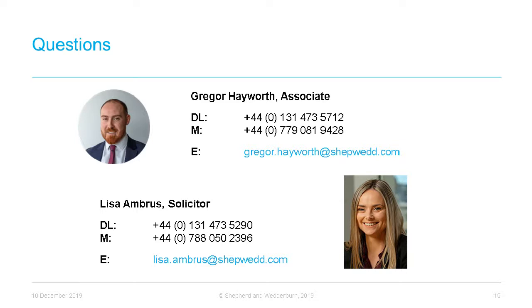In England, the leading case is Henry Boot Construction and Malmaison Hotels, and that was a Technology and Construction Court case. And there were actually a couple of more recently decided TCC cases in England on concurrent delay, and those were De Beers and Atos and the Walter Lilly case as well. And if any of our listeners would like a copy of any of those judgments or would like to discuss any of those cases, then please do just let us know.